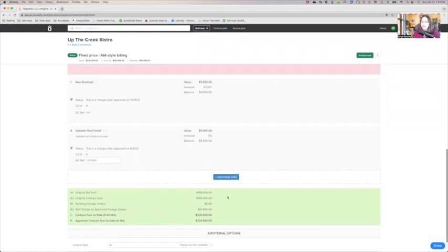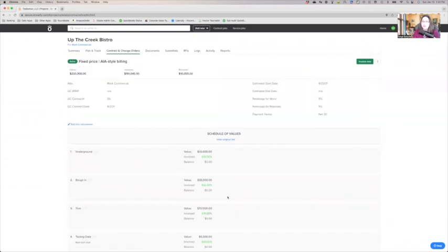Now you can see, again, if you're used to dealing with these AIAs, how this looks very much like an AIA, but it's not like the G702, G703 form just yet, right? You'll even see that it includes retention, what is being held for retention. So again, a lot of the elements that we would typically see on the AIA style documents, but not an AIA style document in front of us currently.